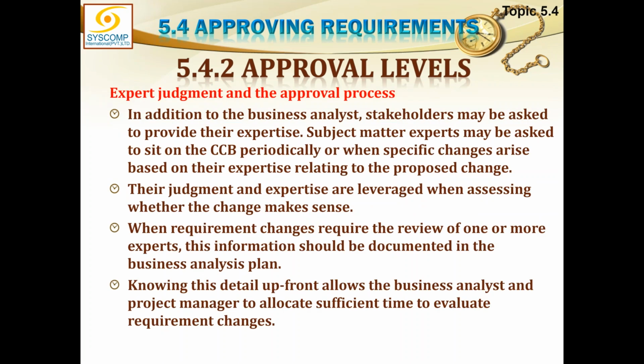Expert judgment and the approval process. In addition to the business analyst, stakeholders may be asked to provide their expertise. Subject matter experts may be asked to sit on the change control board periodically or when specific changes arise based on their expertise related to the proposed change. Their judgment and expertise are leveraged when assessing whether the changes make sense. When requirement changes require the review of one or more experts, this information should be documented in the business analysis plan. Knowing this detail upfront allows the business analyst and project manager to allocate sufficient time to evaluate requirement changes.